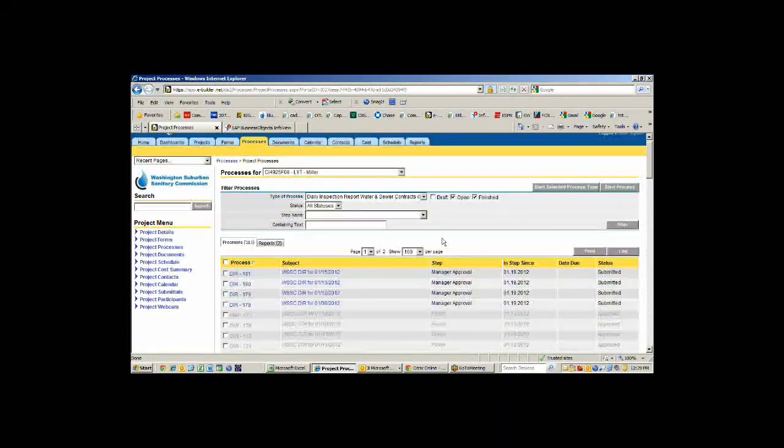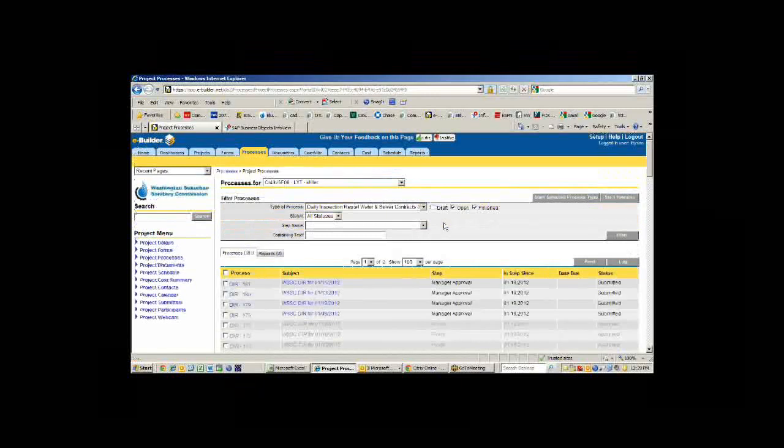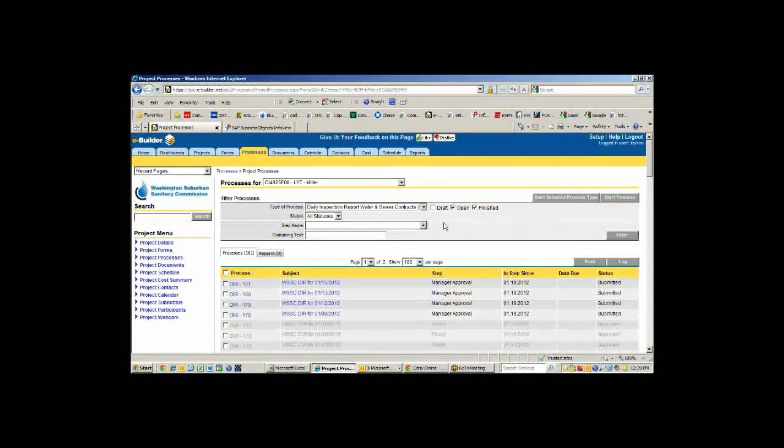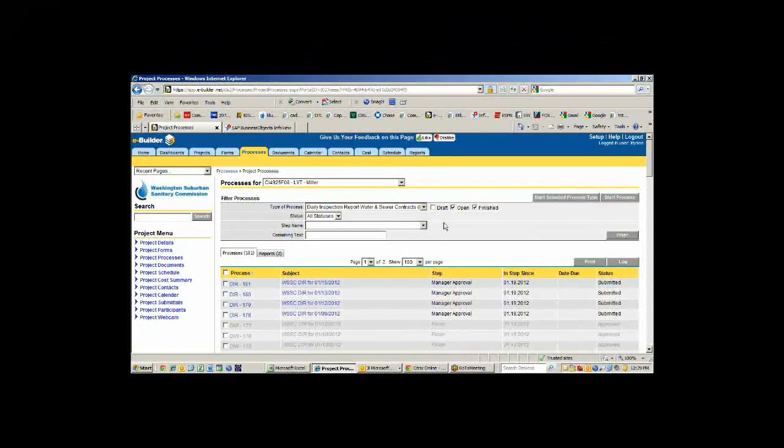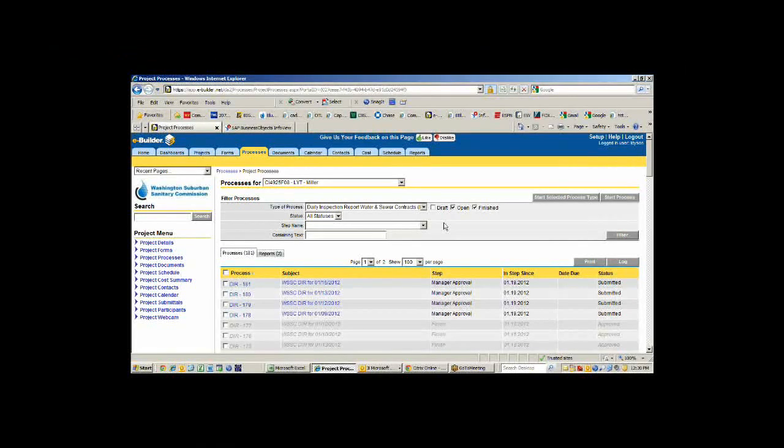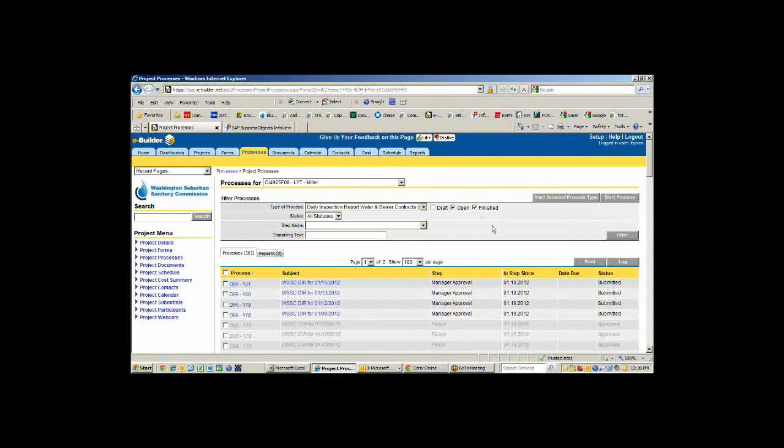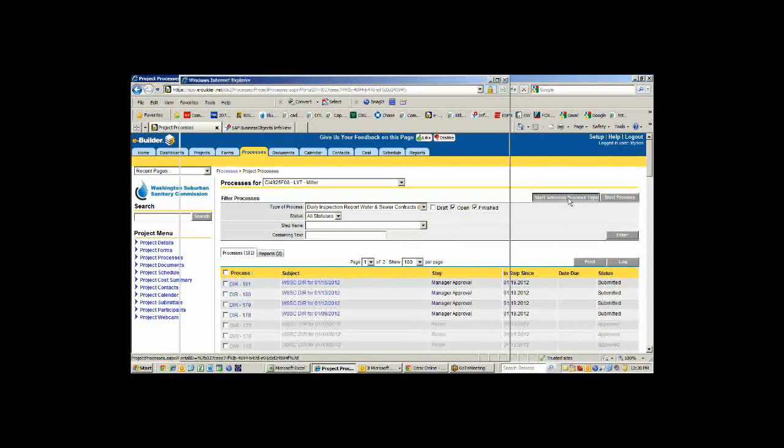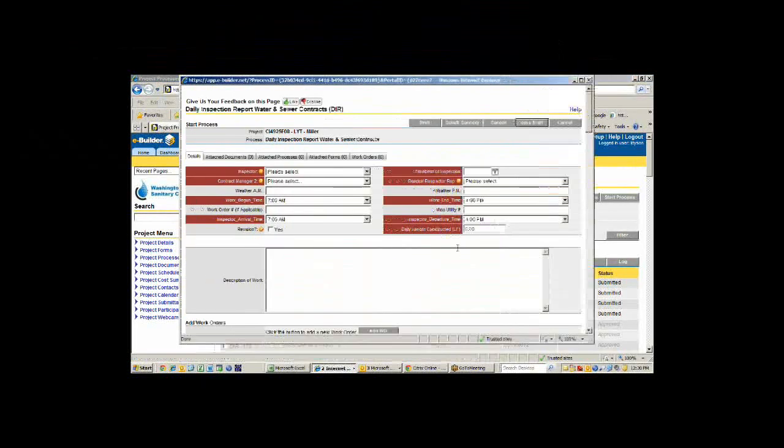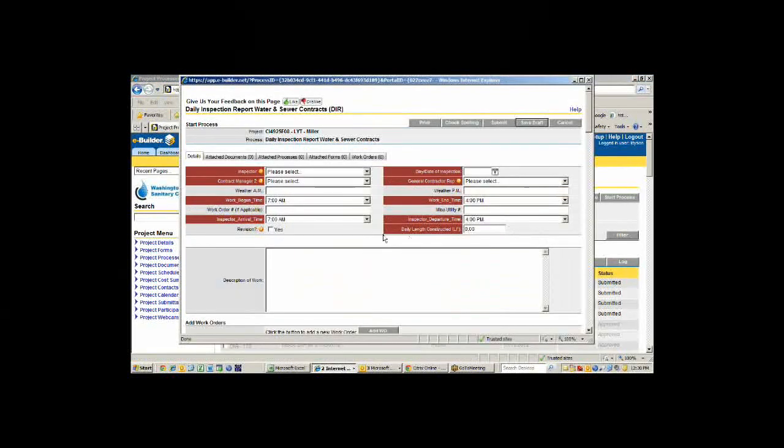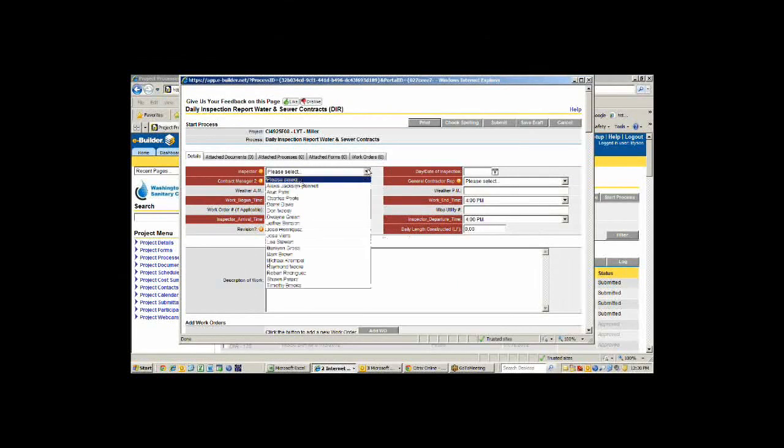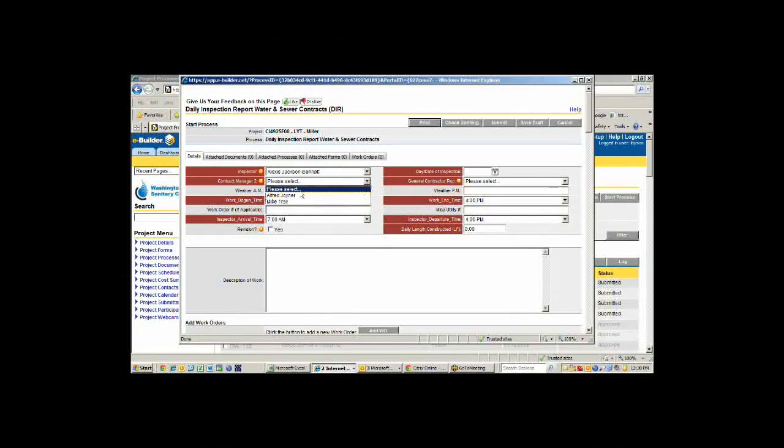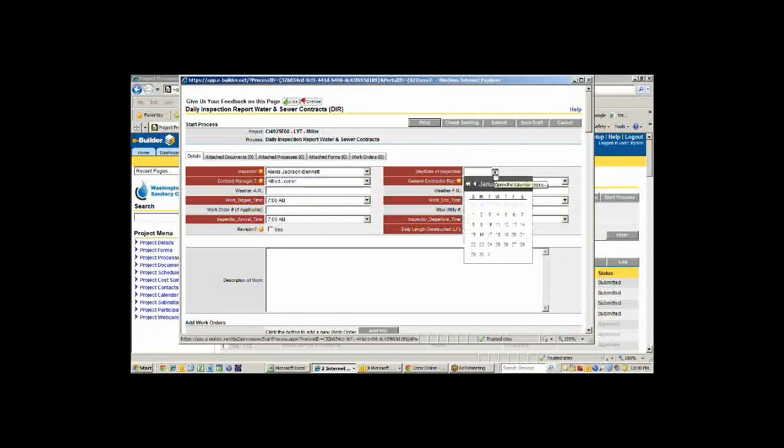Essentially, our process is that every day an inspector goes out into the field, he has to write a report about what information is being done on that particular job. We call it the daily inspection report for water and sewer contracts. So an inspector in the field would pull up his laptop, open up to this page, and then he would start this selected process.